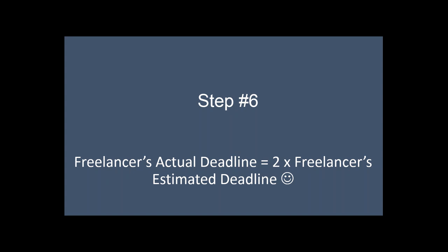All right. So it happens with every project, no matter how small or how big it is. So the freelancer's actual deadline is equal to 2 into the freelancer's estimated deadline. It's twice the freelancer's estimated deadline. So consider that.